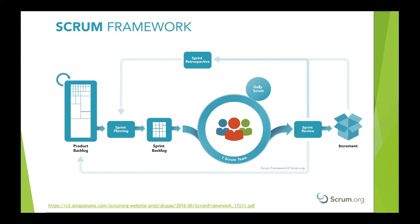A sprint review is held at the end of the sprint, which allows the product owner to review the results of the increment and accept product backlog items that meet the definition of done. Based on what was learned during the sprint, adjustments to the plan can be applied, setting the stage for the next sprint planning event. Prior to starting the next sprint, the team will conduct a sprint retrospective to review how the team is working together and applying the Scrum framework, with the intent of continually improving their efficiency and quality.